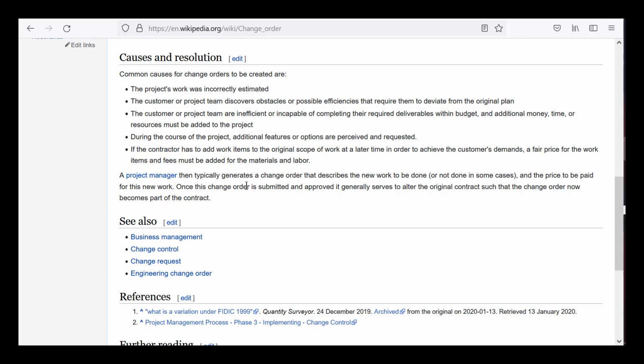Now, if you issue a change order for that, in addition to CHS calculating the overage on an allowance, it turns out that you could accidentally be double dipping, but not in CHS. If you issue a change order for an allowance cost code and you do your allowance over-unders to show the buyer, you'll see that if there's been a change order for it, it's going to adjust the allowance down, and then the change order is going to be added to the contract. I know that's a mouthful, but I just wanted to say all of that up front for an overview.